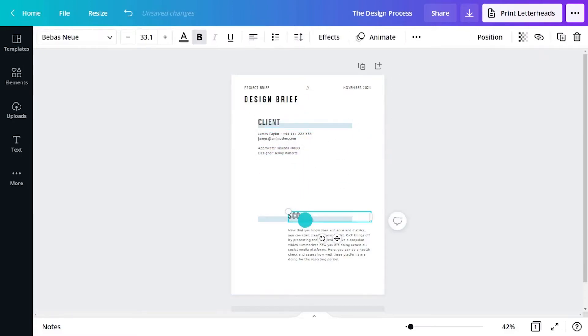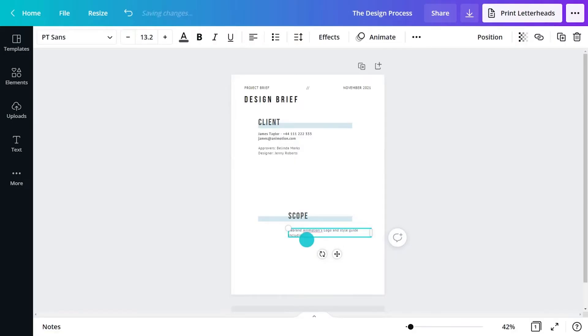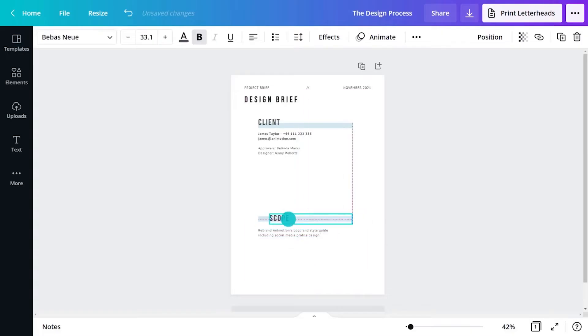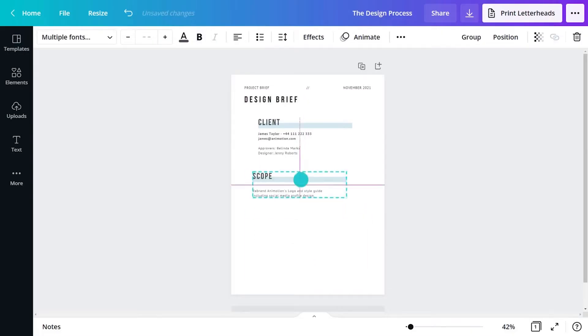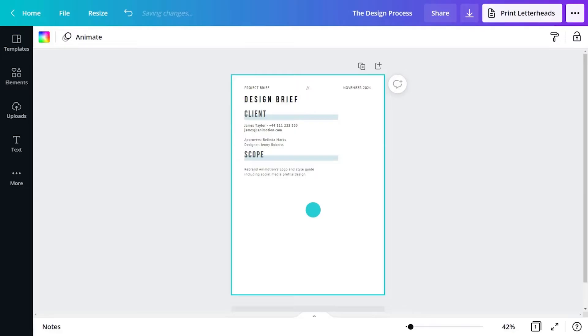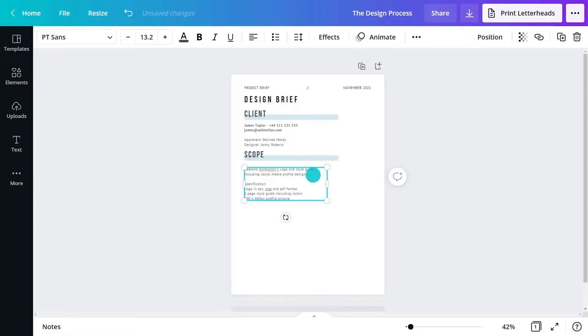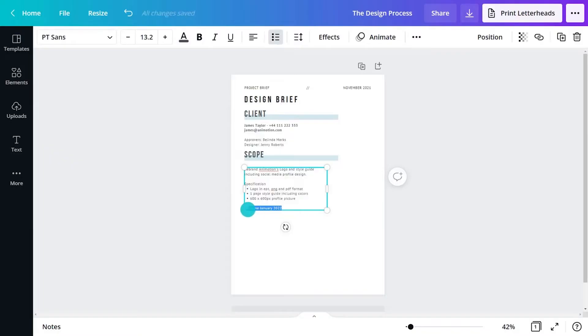The next section of the brief explains the scope of the project. The scope describes the deliverables required. Short statements are better than long-winded descriptions. Outline format, size and quantity of items needing to be created. The scope also summarizes timeframes and deadlines. This needs to be clear.